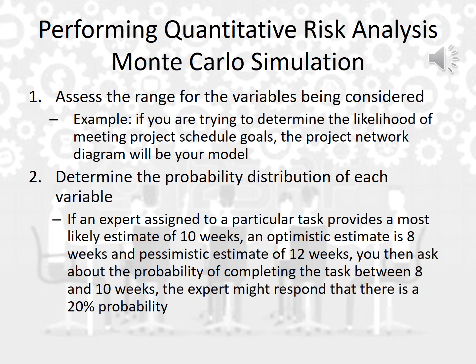Step number 1, assess the range for the variable being considered. Here I need to assess or evaluate the variables that I consider, the variables that will be in the simulation, in the calculation. An example: if you are trying to determine the likelihood of meeting project schedule goals, the project network diagram will be your model. So if I want to check whether I can meet the objectives of the project schedule, I may use the project network diagram here.